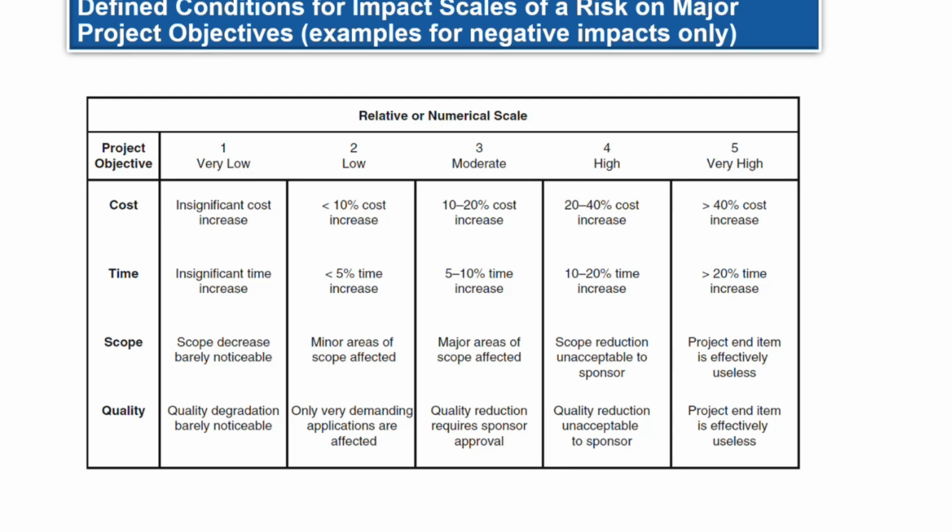Because impact of risks ultimately needs to be assessed in terms of project priority, different kinds of impact scales are used. Some scales may simply use rank order description, such as low, moderate, high, or very high. This is a very simplified method to rank the impact, but this can be quite subjective. But when you're an expert working in this business for many years, then your estimation can be quite realistic. But still these are qualitative estimations, and some may focus on the projects in general, while others focus on specific aspects. The risk management team needs to establish upfront what distinguishes one from three, for example.